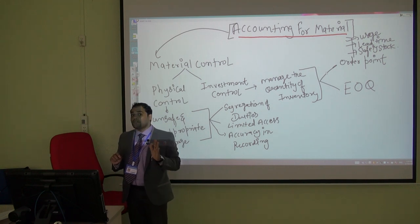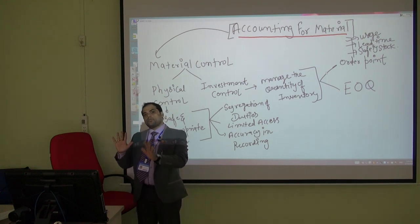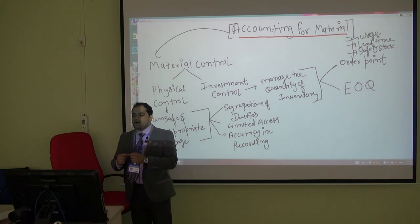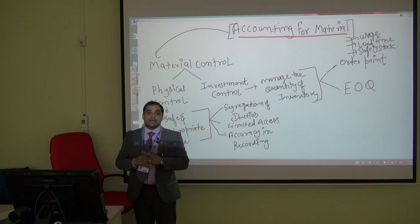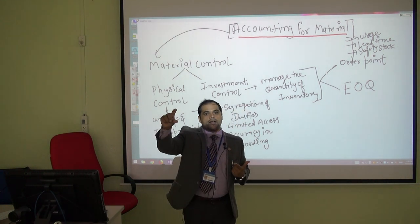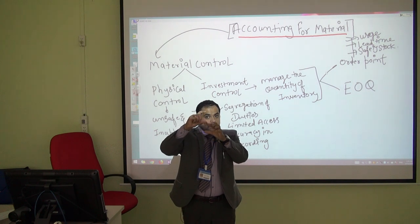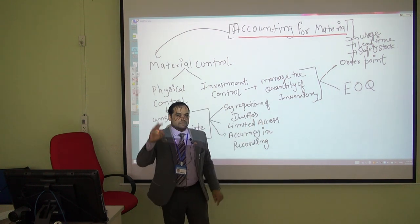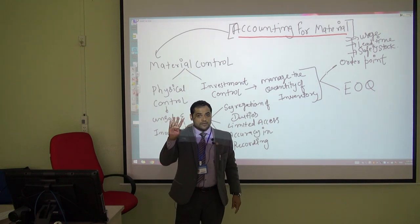So the idea is to keep some backup stock. Instead of exactly three kilograms, I keep four to five kilograms — assuming four to five days — so that if the supplier is delayed by one or two days, I still have material available. The order point formula is: usage multiplied by lead time, plus safety stock. For example, if usage times time equals three kilograms and safety stock is one kilogram, then the order point is four kilograms.